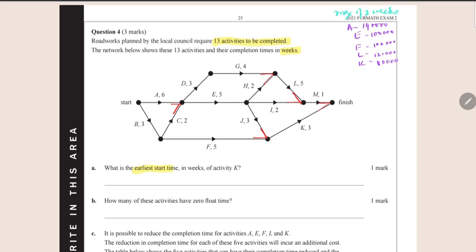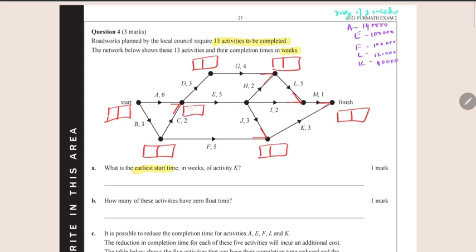So when making a choice at these vertices, you have to choose the larger value as you do the forward scan. I write a box at each one of those vertices.